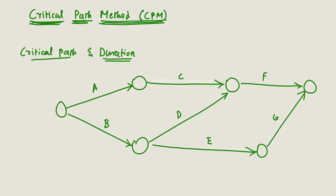These are all the activities present in the project, and every activity has a duration. For example: A is 5 days, B is 3 days, C is 5 days, D is 6 days, E is 10 days, F is 7 days, and G is 5 days. Now we can find the different paths. The first path is A-C-F.